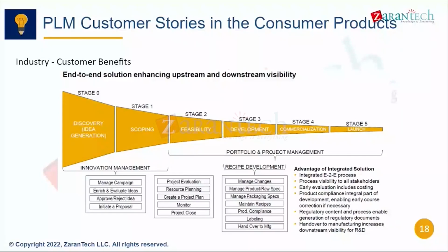They will have to start the project, and in the project they can allocate some budget, and from that budget they can allocate. They will do the financial planning. They will do the capacity planning at project portfolio level, where the CEO of a company or leadership can see what is happening with respect to that product development, and they can track from start to end what was the cost consumption, what was the time taken to develop that product, what all the resources and capacities are involved from start to end.